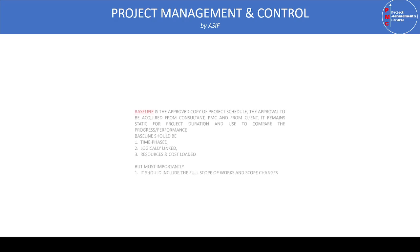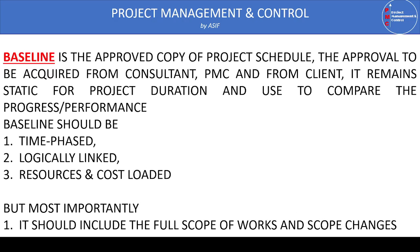The baseline program is the approved copy of the project schedule, which is normally made at the commencement of the project. We need approval from all stakeholders, including the project consultant, any PMC services provider, and the client. Once all parties approve the program, we make it fixed, freeze it, or make it static for the duration of the project.